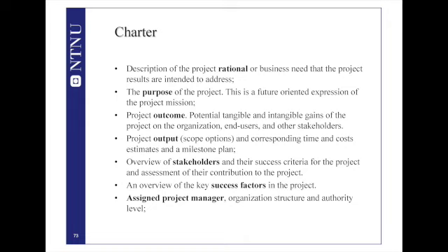This particular project manager got a task orally, without any paper, without any documentation that tells what the expectations are, what the needs are, why this is important. So in this project manager's mind, there was a gap. She was not able to decide how far she could go in order to satisfy the oral expectations of the project owner. So therefore, we say a charter is always a good start.